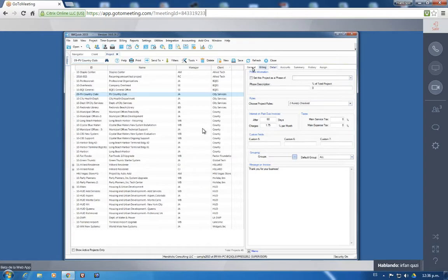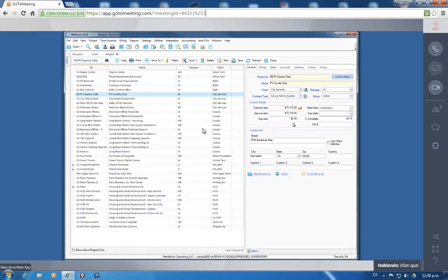And if you want employees to put in time, anything that you go over budget will be non-billable. It will mark it as non-billable, even though the billable activity is billable. But on this project, if you have gone over budget, you will be able to see how much amount you have gone over budget by. So all these things can be tracked by BillQuick automatically.